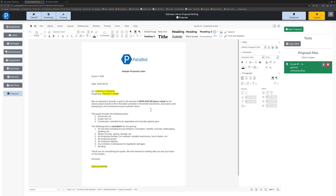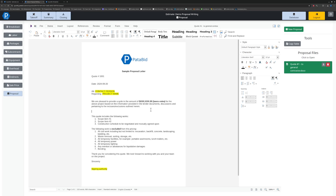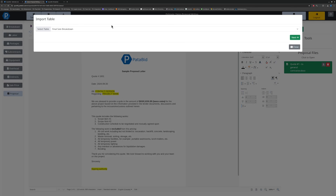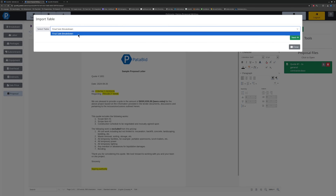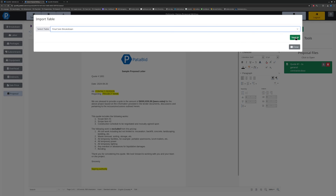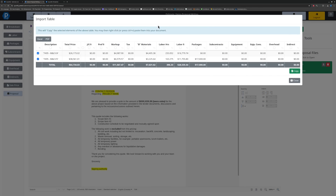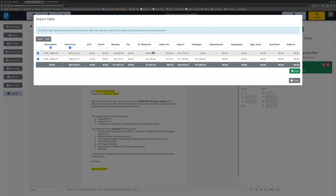One of the unique things is to bring in the closeout breakdown table. To do that, we can click on Copy Table here in the top right. I'm going to click Copy Table, select the Final Sale Breakdown — it is the only one available right now — and then hit Next. It's going to bring in the closeout table that we have in the sale price screen, and I can check off which columns I want to copy in and which rows I want to bring in.